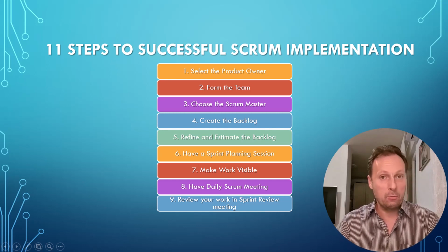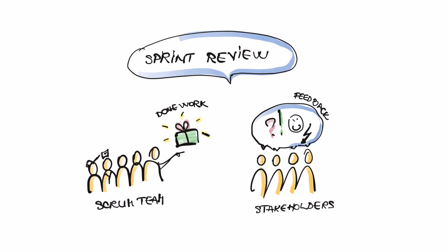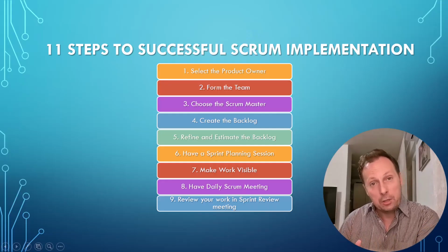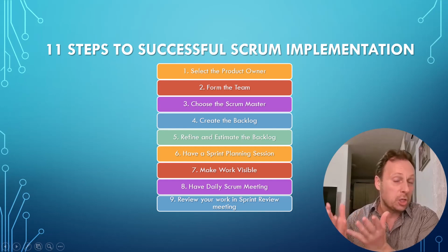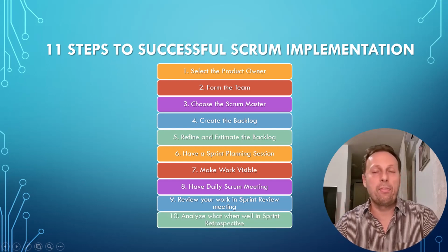The team should demonstrate only what meets the definition of done, what they have accomplished, what is entirely finished and can be delivered without any further work. It may not be a finished product, but it should be a finished unit. Okay? Let's move to step number 10.